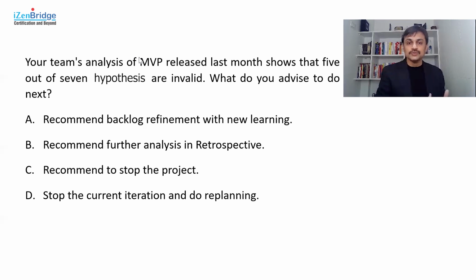It might result in recreating our hypothesis with the new learnings, and then checking if the modified approach can work. That's one possibility. Or we may change the whole direction of our product offering or a customer segment, which is also called pivot. So it's a turning point. We need to do something about it.